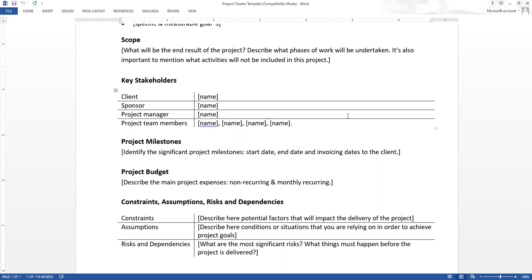The project budget. Nowadays, many project managers don't have budget in their purview. They just have a standardized cost mechanism, and we'll see how the budget is managed by the financial controllers of the project. Financial controllers are the glorified accountants who keep tab of what the resources are and the daily value of each resource, and then they give these details to the project manager on a weekly review basis so that he will understand if we are going above the budget, below the budget, or in line with the budget and all those things.